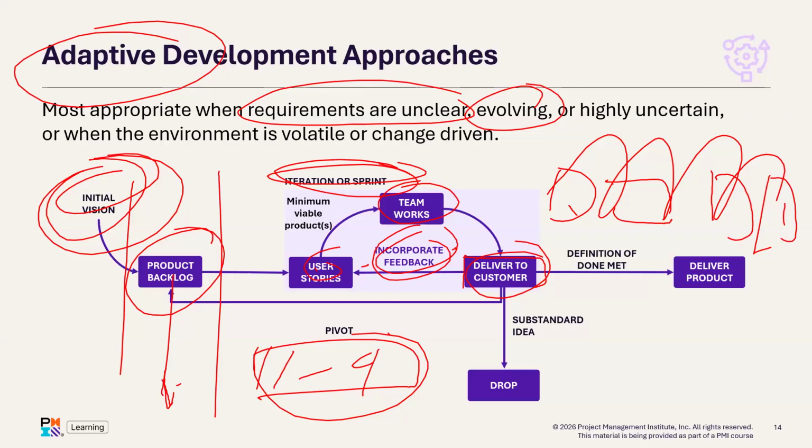Because of that, if the team feels what we are going to do is too technical, too uncertain, and we need frequent feedback, then make the time box shorter, maybe 1 week or 2 weeks. Maybe you don't have to build the entire engine. Divide it into 3 or 4 parts, finish one part, get the customer to inspect or review and give you feedback to refine and perfect it.